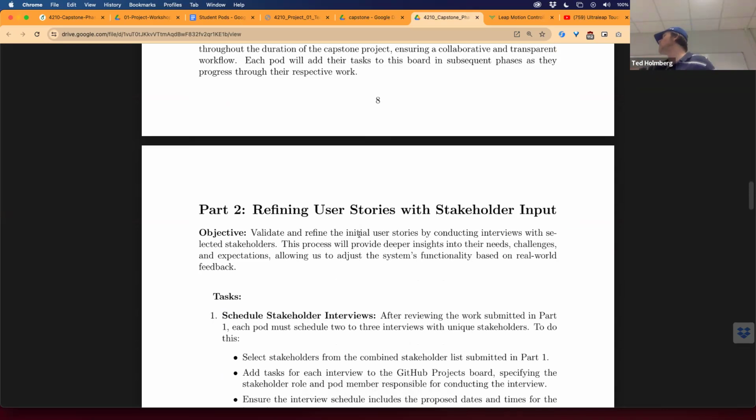And then as we start delivering our MVP, we bring them back in and have them test it out. And that's when we hear, oh, this is kind of difficult to use, or I kind of want to be able to do this. Then we can start adjusting towards their new feedback. We can eliminate things that we thought were going to be planned additions, kick them further back into the roadmap, or take things that weren't there and add them into the roadmap. So remember, our roadmap is a guide. It's not a rule set. It gives us a way to plan for the future, but we're not bound to it. That's the point.